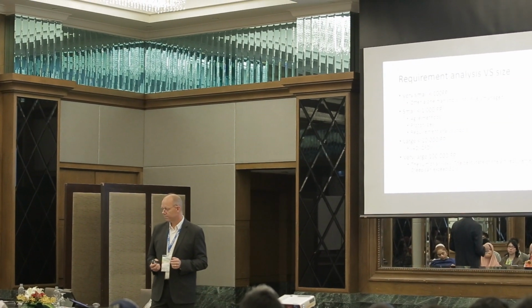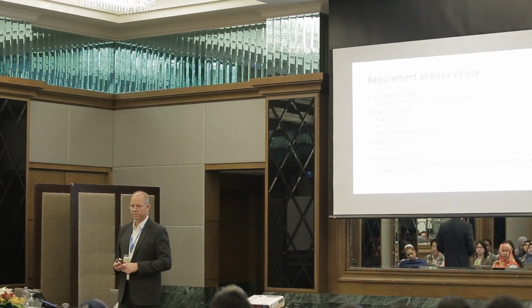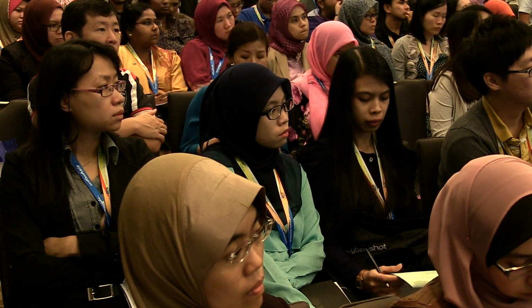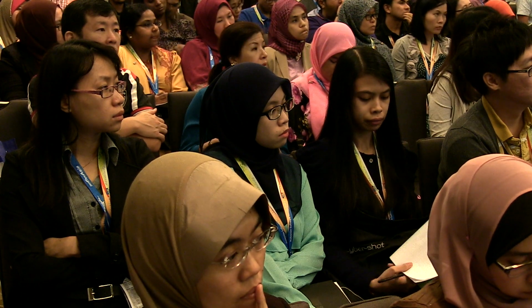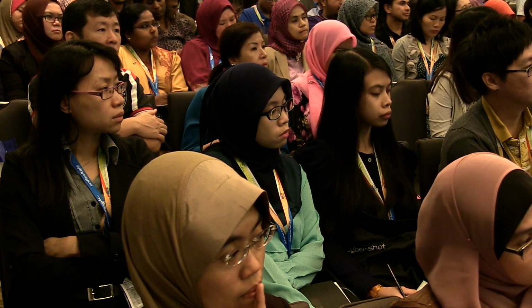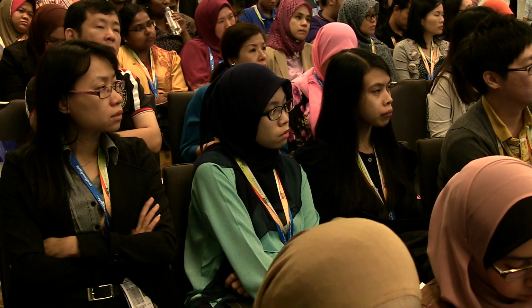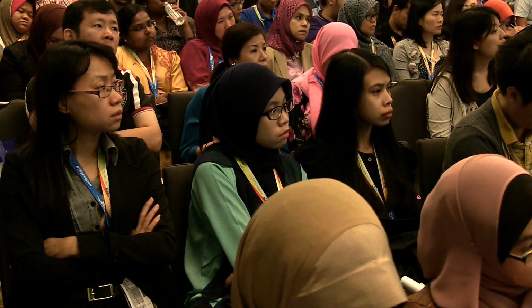Large projects, say 10,000 function points, now we're talking big administrative public systems or something like that. That's where joint application design techniques and quality function deployment turn out to be very useful to get control of this. Still, there are many other techniques than these; these are the techniques that have been reported into databases, and we know that they actually support these sizes of projects.